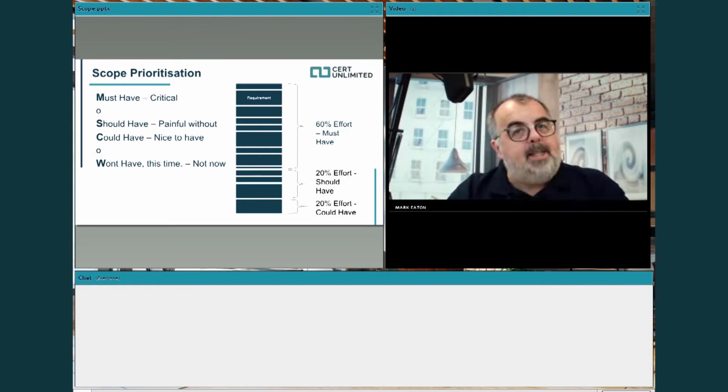And notice that's based on effort, yeah? Not just a number of stories or a number of features. That's built on effort. So we build priorities to help us create contingency in scope. And sometimes people struggle with Agile, and one of the reasons I've noticed is because some of it is counterintuitive. It's not built into our way of thinking. Leave something out, not deliver something.